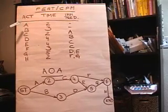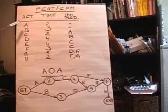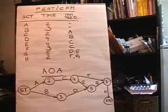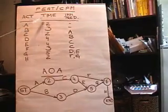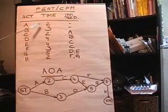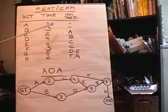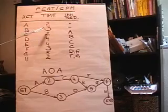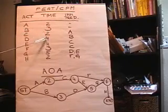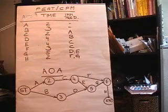Let's assume that we've got a project that has these eight activities, and we'll label them A through H. And let's assume that we know the times for the activities. Activity A takes two days, Activity B takes three days, and so on: two, four, four, three, five, and two, respectively.